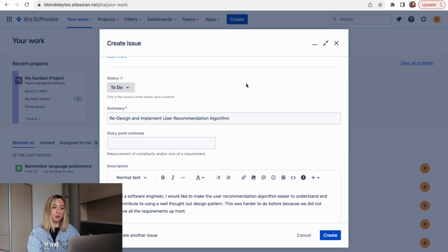And when we were thinking of pointing this, we decided on the number 144. This is our story point estimate. And to give some context on this, when you point a story, you are essentially assigning its complexity. It's based off of the Fibonacci sequence. So typically you don't want a story over 5 points, and so you might do a 1-point story for like a 1-line change. And then you'll have 3, this is like a medium. Ideally, a lot of your stories are 3-point stories.